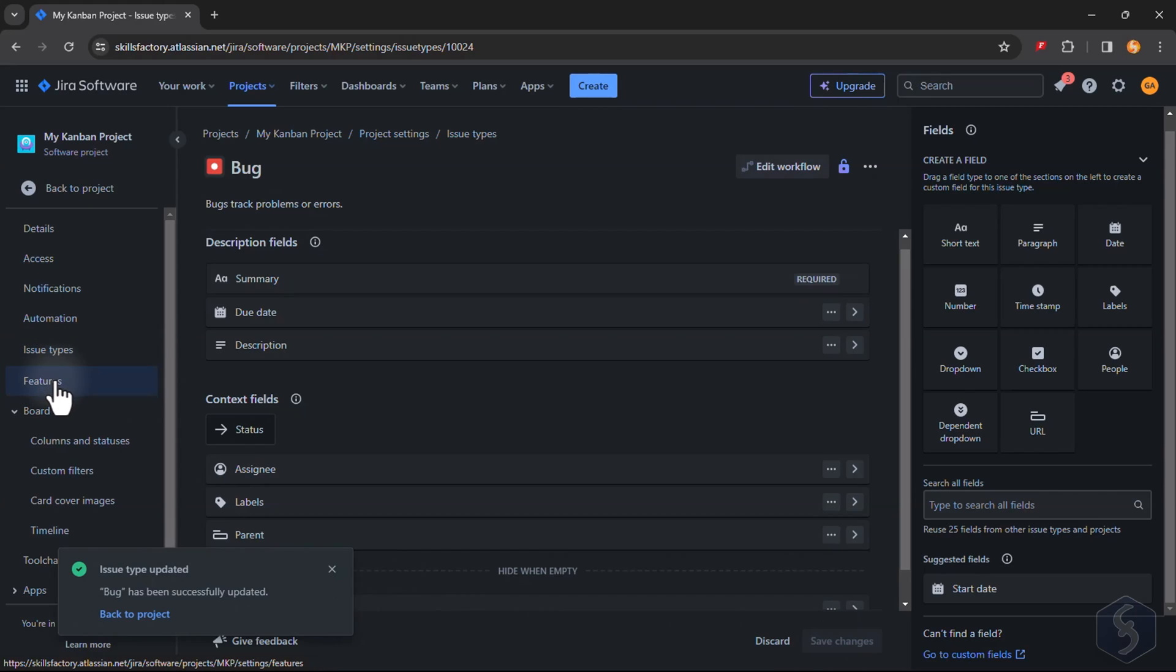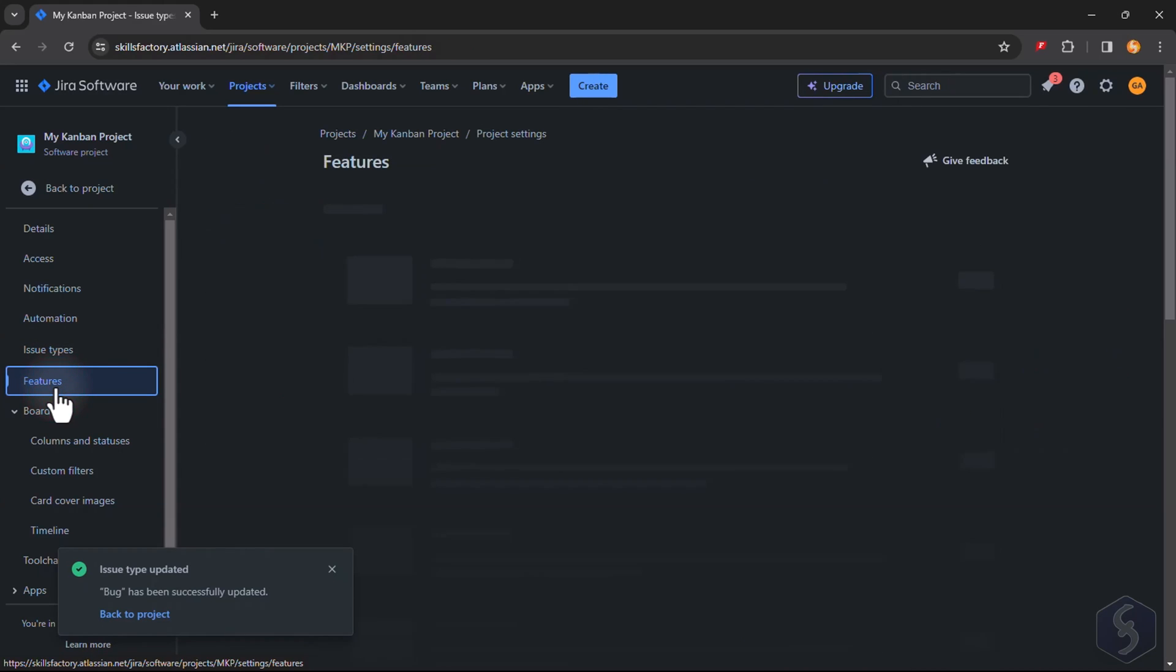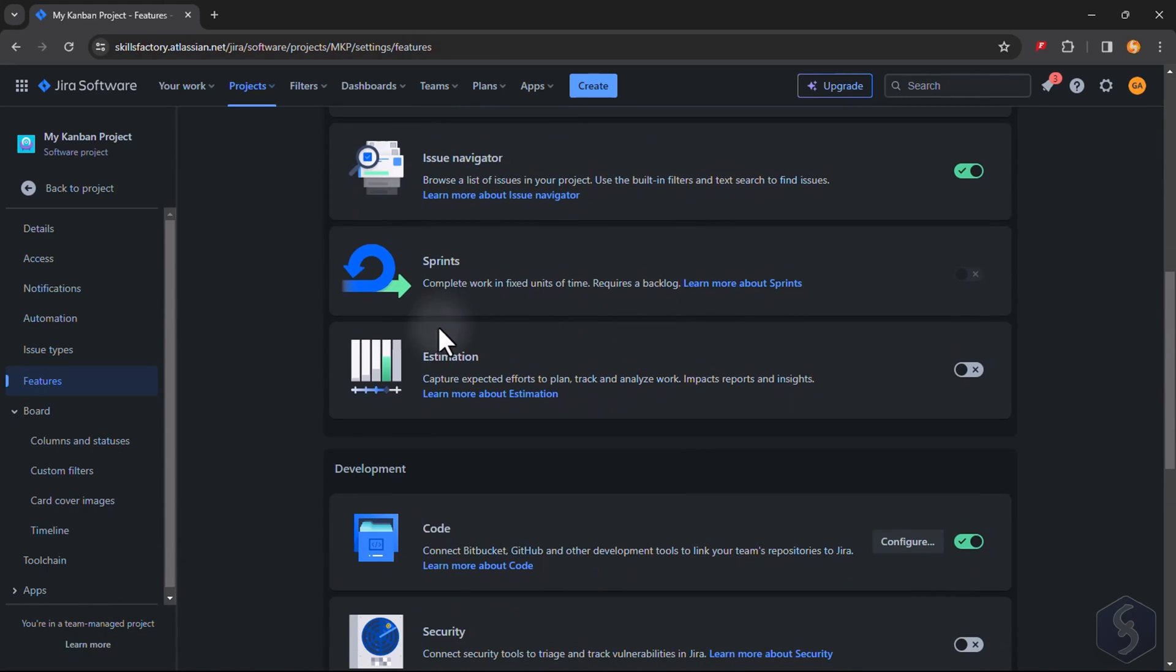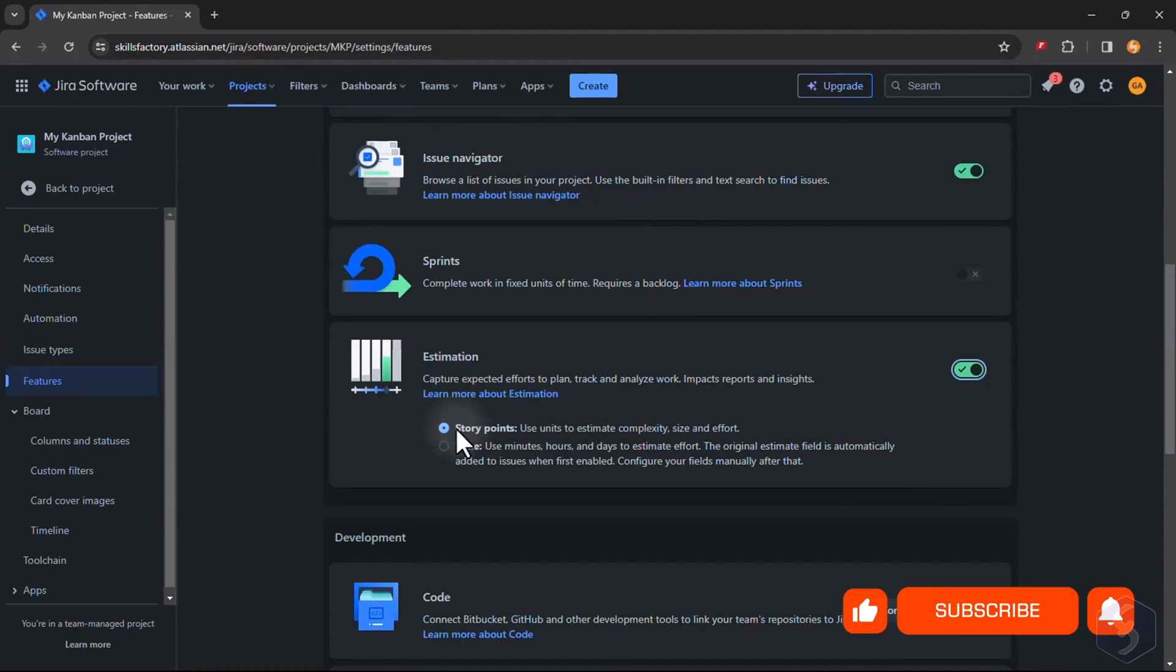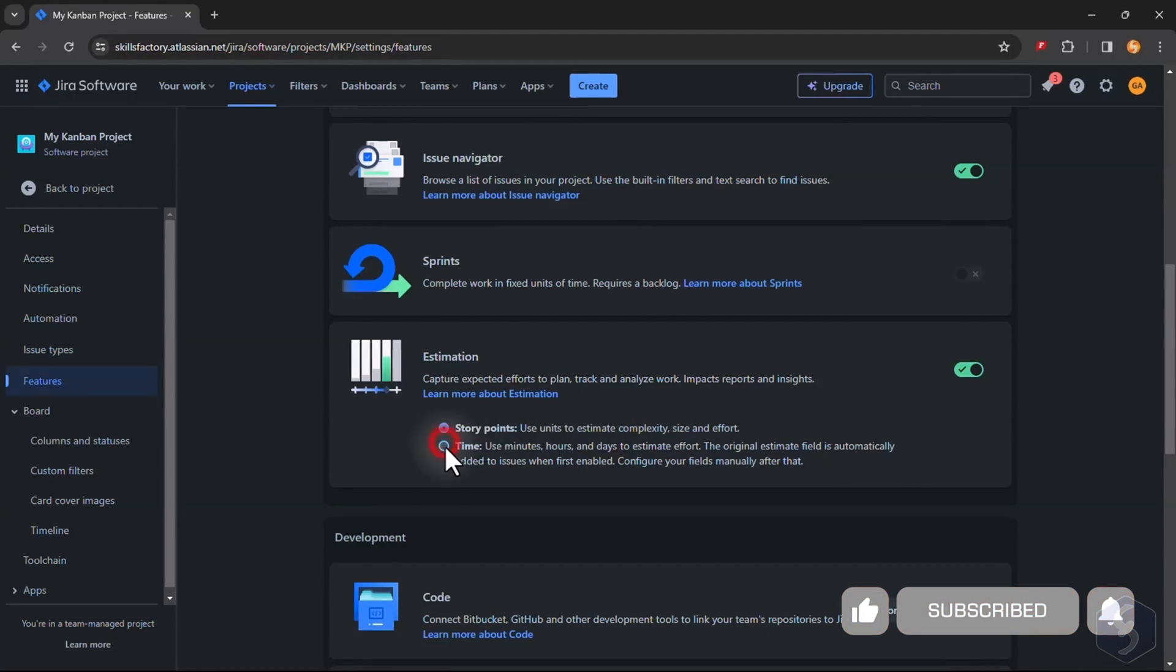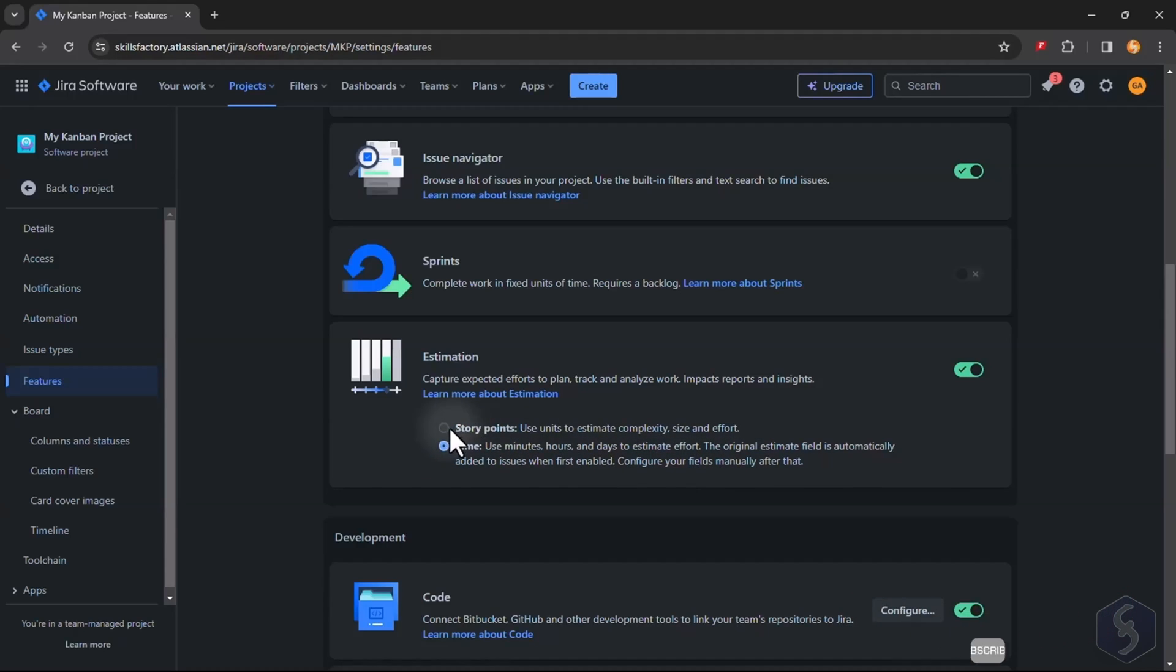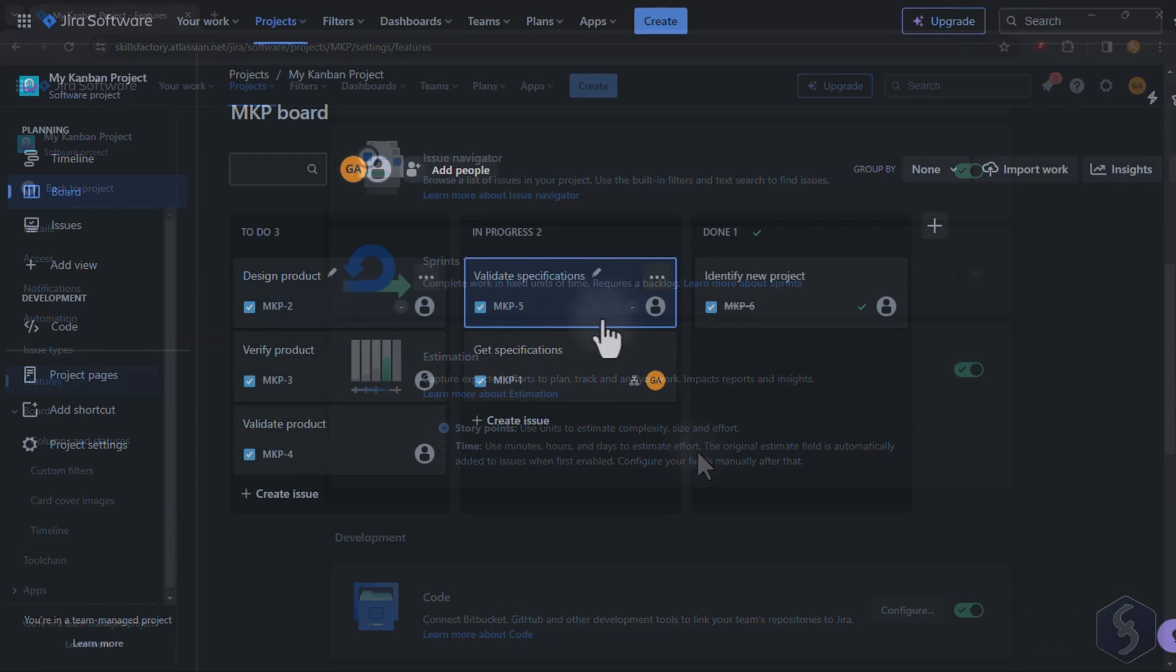Return to the Project Settings and go to Features to enable estimation. This allows you to assign a time effort to each issue expressed in a generic unit called Story Points or in minutes or days.